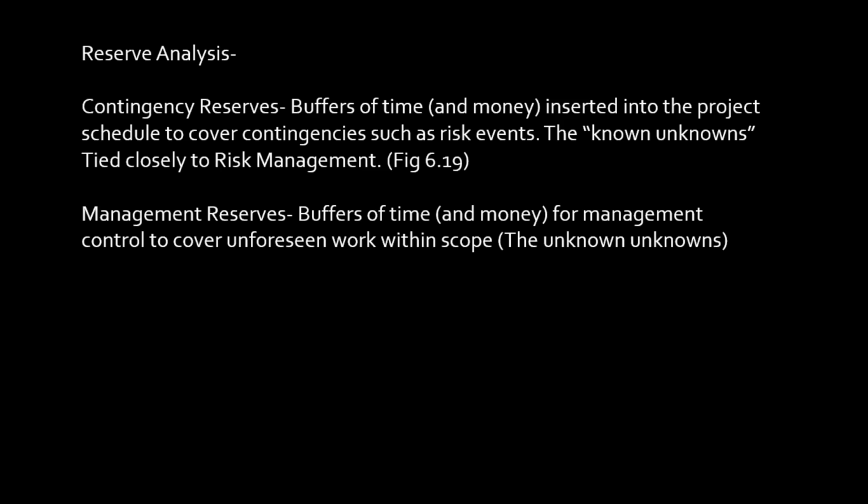The management reserves are for the unknown unknowns, to cover the unforeseen things that maybe should have been in the project and we missed, or some major thing happened, but we still want to keep the project going. They're not going to be part of your cost baseline, but they are part of your project budget. I will show you what I mean by that when we get to cost management. But the biggest difference is that you need to know about contingency reserves and management reserves. The contingency reserves are ones that you can use; they're applied to the tasks. Management ones are ones you have to ask for. The first ones are for the known unknowns, and you're probably going to see that on the exam: known unknowns and unknown unknowns. When we get to risk management, we're going to talk about them again.